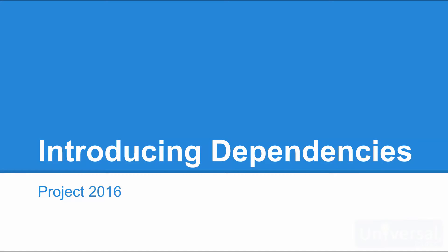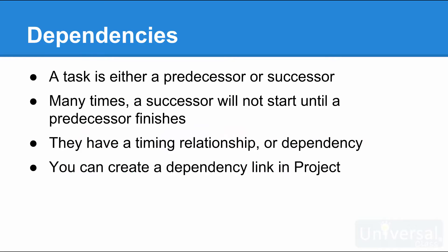Introducing dependencies. A task is either a predecessor or a successor, meaning it comes before or after another task. Many times, a successor task will not start until the predecessor task finishes — task B will not start until task A finishes. This means they have a timing relationship. When two tasks have a timing relationship, they are a predecessor-successor pair.